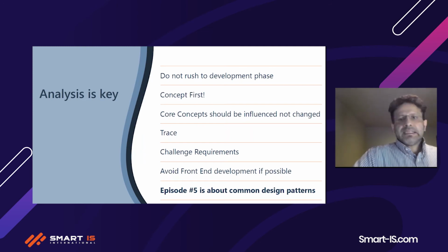So we must never rush to development. The project should not start with, "Hey, I'm getting this MHE system, this is the integration spec, go at it." That would be the wrong way to approach the problem. We should always do a proof of concept, a pilot or something like that, using the standard concepts, and work with the business to say these are the standard concepts which we are going to influence with our change. And that is how the project should proceed always.